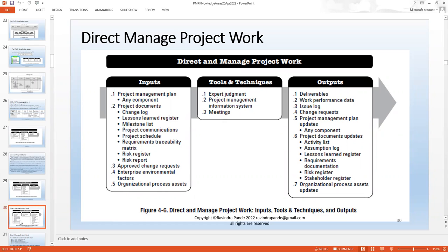So that way we normally have a task and a subtask assigned to a resource. Now these tasks normally include the functionality which I mentioned in the SRS or the requirement list, right? And we normally build a complete list, or we update the list of requirements, with the resource attached, the functionality to be developed, and the task and subtask to be developed. So these are basically what we are talking about in an RTM, requirements traceability matrix. It shows how the requirements progress with a particular task, with a particular subtask, and so on and so forth.